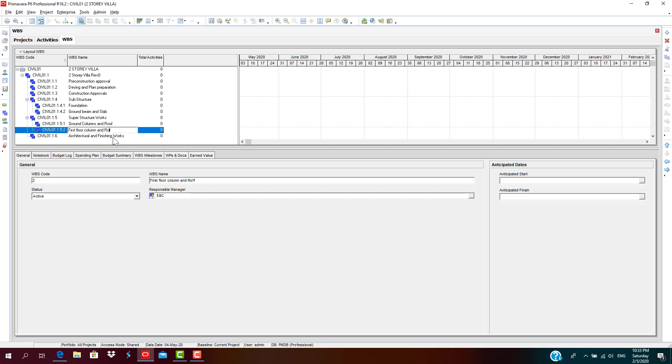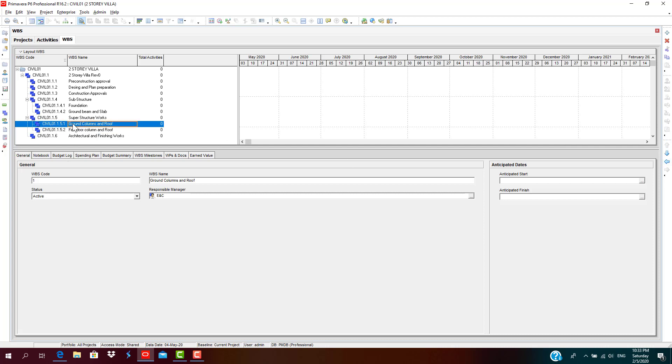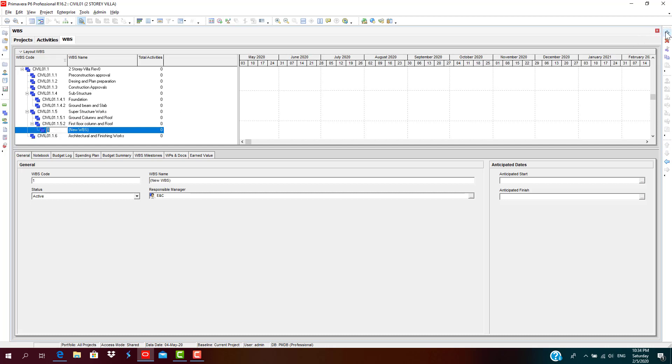You must make sure that you are indenting as per the work structure, so you are not messing up, like collapsing or indenting under some different thing. You have to sequence it in an orderly fashion. So substructure consists of ground column and roof, first floor column and roof, and various other details. Let's add second story.